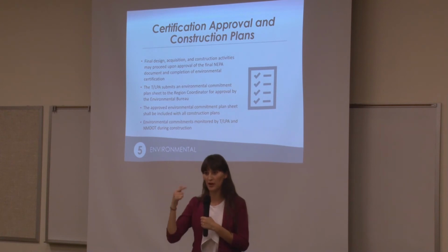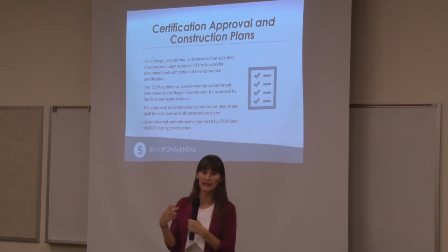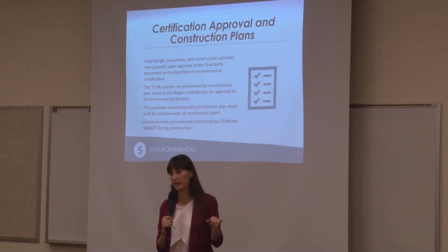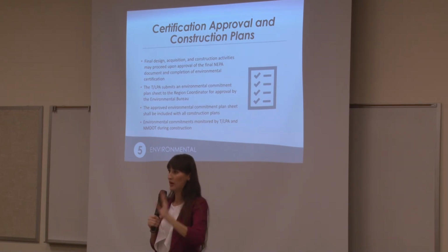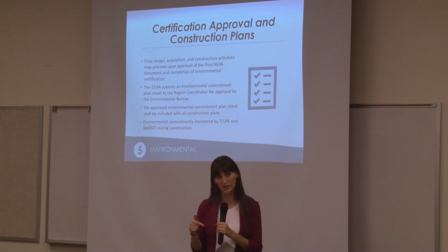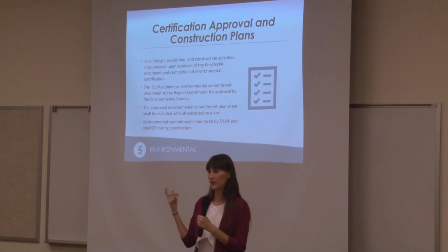Those commitments need to be incorporated into your plan set. And so during our design review meetings, the 30, 60, 90, and PSNE, the region coordinator and our CLEs will be checking to make sure that those things are in your plan sets. Through construction, we'll also be monitoring this in the field reviews.